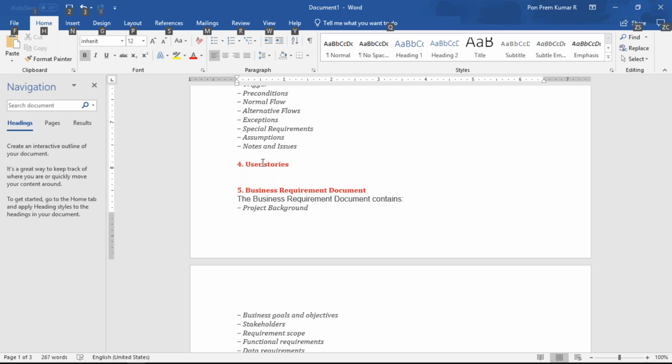If any requirement is too big for a single user story, break it down into a number of user stories, making it easier for estimation and discussion. In such cases, the main user story acts as an epic. It's called a parent or epic user story.